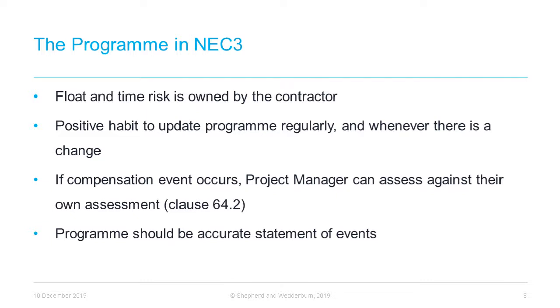Failure by the contractor to submit revised programmes is of considerable disadvantage to the contractor, as if a compensation event occurs, the project manager may assess it based on their own assessment of what the programme should be under clause 64.2, which can have a negative impact on time claims. On that note, let's now move on to a discussion of additional time claims.